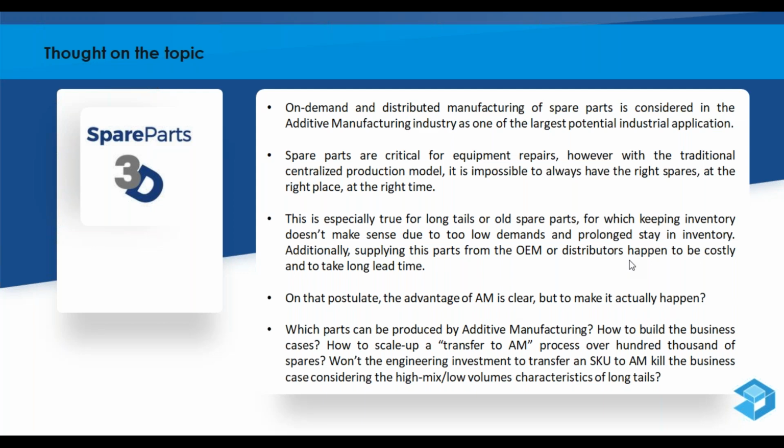Then the second business case is shortening lead times. A good example is around metal parts that are coming from casting or forging. These conventional processes often have very long lead times to procure, and there is the ability to produce parts and not necessarily reproduce them. I'm always supportive of design for additive manufacturing when there is a business case to do so. The ability to produce these parts on demand with shorter lead times can have a drastic impact, especially when it comes to reducing the impact on the business by shortening the delivery time.